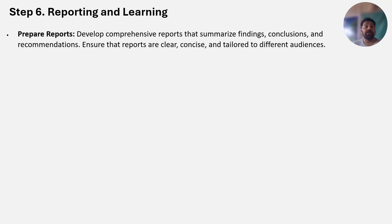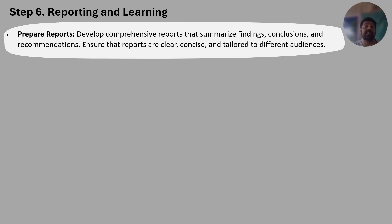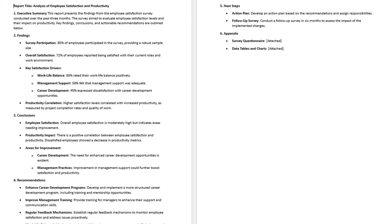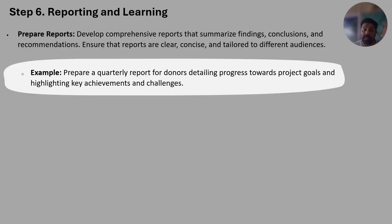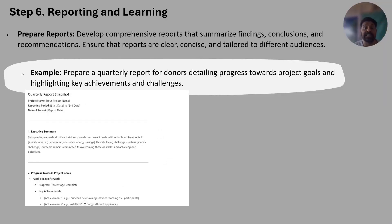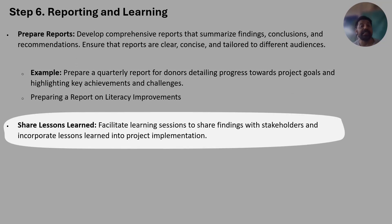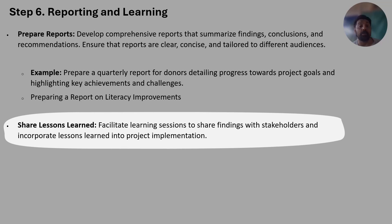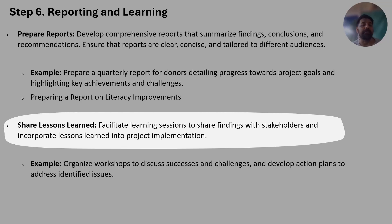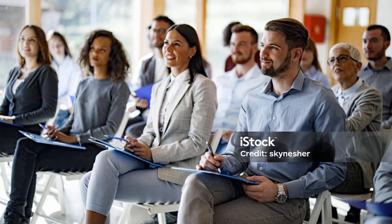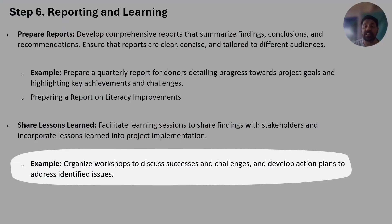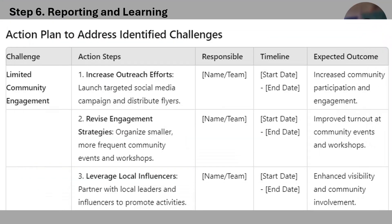Step six is reporting. Develop comprehensive reports summarizing findings, conclusions, and recommendations. For example, prepare quarterly reports for donors detailing progress towards project goals and highlighting key achievements and challenges. Share lessons learned by facilitating learning sessions with stakeholders, organizing workshops to discuss successes and challenges, and developing action plans to address identified issues.